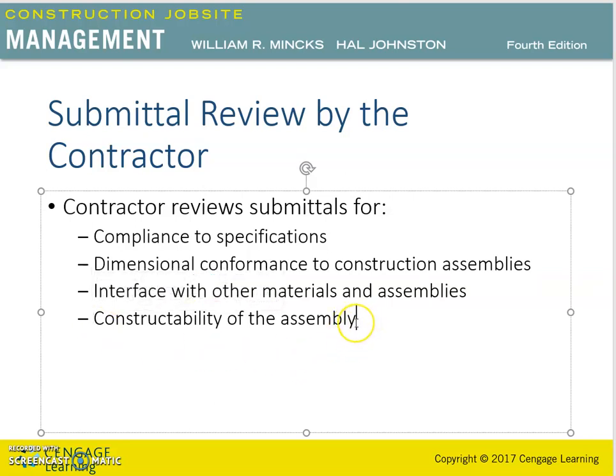So the contractor receives the submittal from the supplier or subcontractor prior to forwarding it to the architect, and is expected to review the submittal and stamp it as having been reviewed prior to submitting it to the architect. So this step is good in fact, because it may reduce the review time by the architect. If the contractor can review it by himself before submitting it to the architect, the review time from the architect may be reduced.